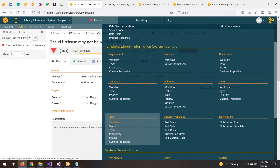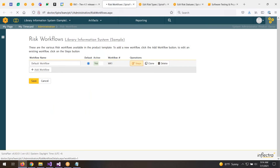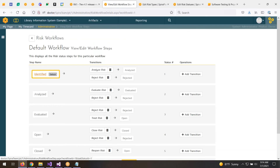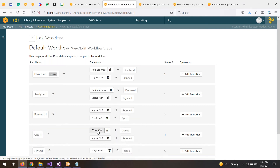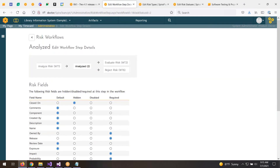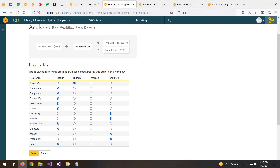Going to the workflow section and clicking on steps, you can see this is the default workflow. We identify the risk, analyze it — it becomes analyzed. From analyzed, we evaluate it — it becomes evaluated. Once evaluated, we either reject the risk or treat it. When treated, it becomes a mitigated open risk to be managed, and ultimately we might close it. At any given status in that lifecycle, we can specify which fields are hidden, which are read-only, and which are required.